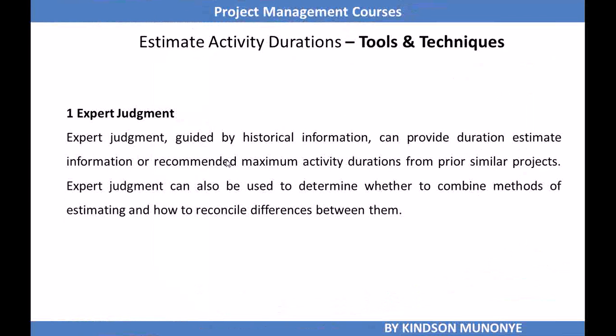Tools and techniques for estimate activity durations include expert judgment, guided by historical information, which can provide duration estimate information or recommended maximum activity duration from prior similar projects. Expert judgment can be used to determine whether to combine methods of estimating and how to reconcile differences between them.